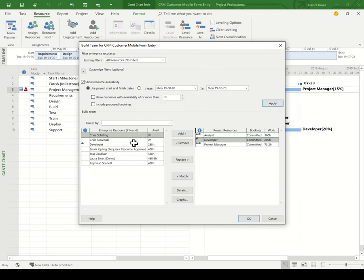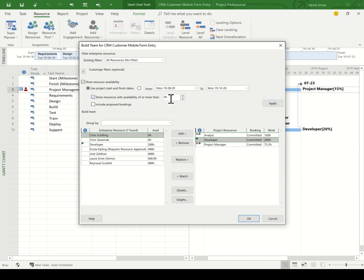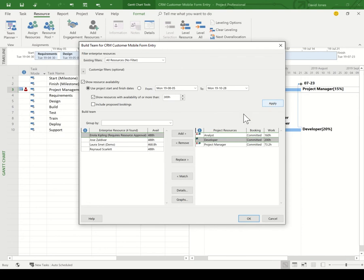Now here are all the people who are available. However, I can see Chris Schilling and Chris Lewinsky really aren't available. They have no hours available. So let's do a little more querying, and I'm going to look for resources who are available for more than 300 hours. There we go. I have four resources now.